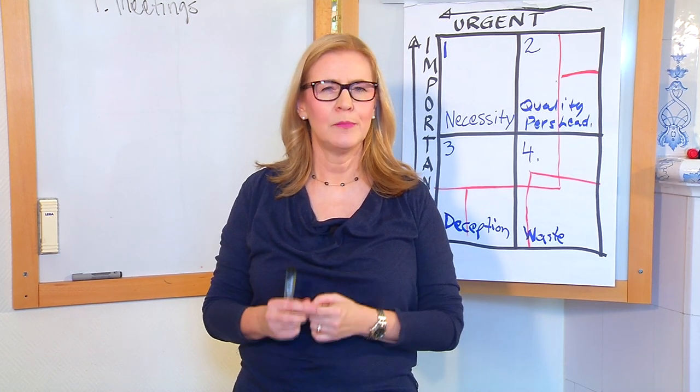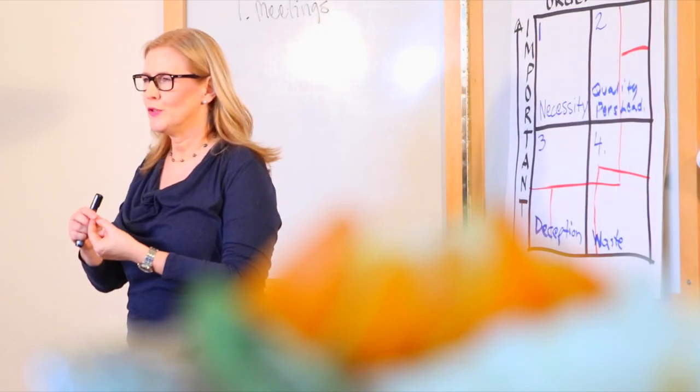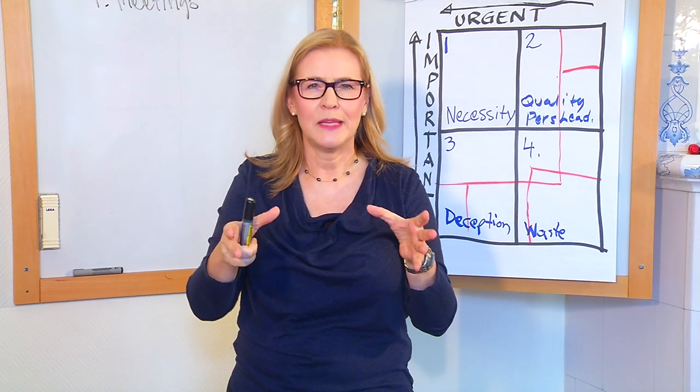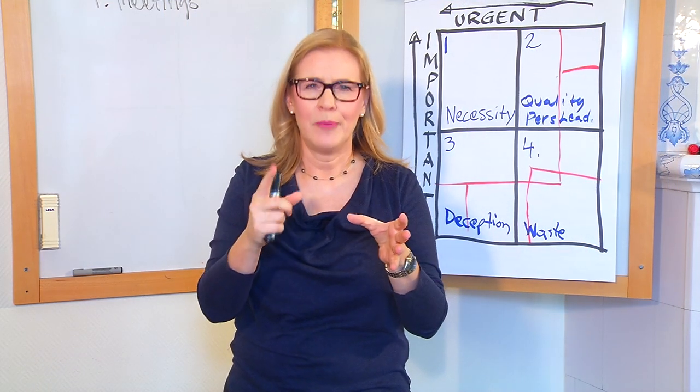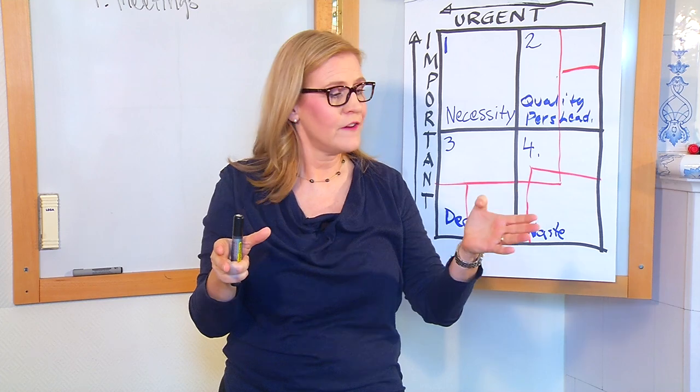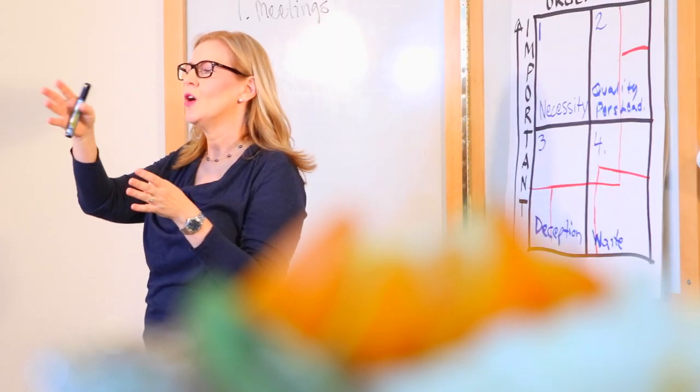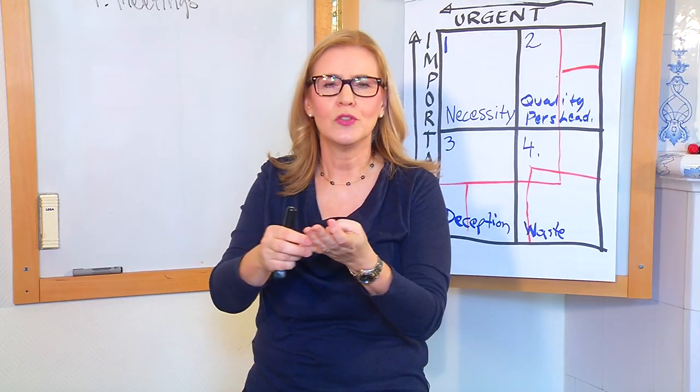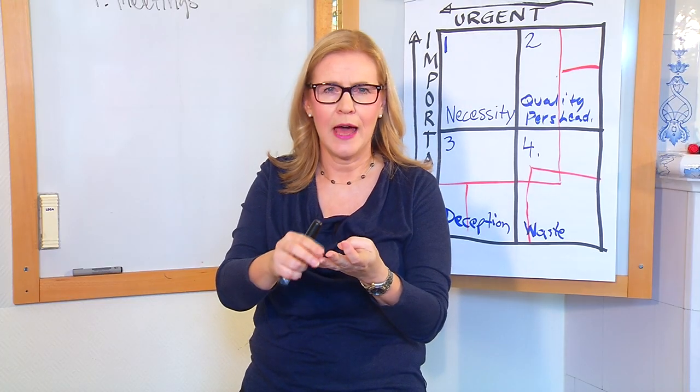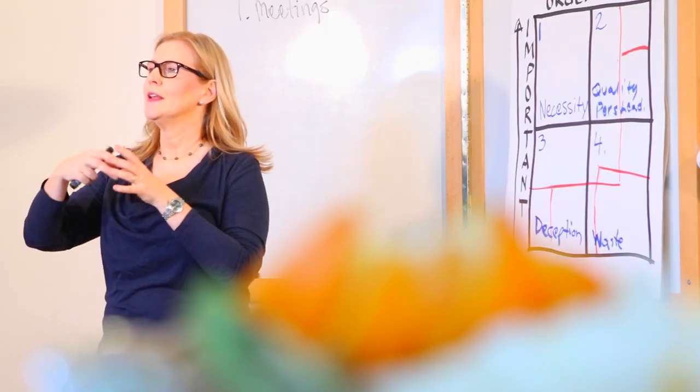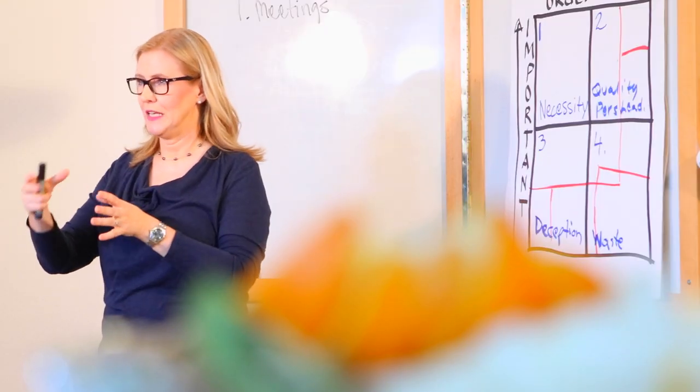A really good tip about meetings is if you're a project manager and you have an issue and you have your colleagues and you want to have this meeting and talk about this issue, the best thing is to ask a friend to be the chairman of the meeting because the chairman will look after the other people, hold on to the discussion, check the time and let everybody talk, and the project manager can only be in charge of the issue itself.